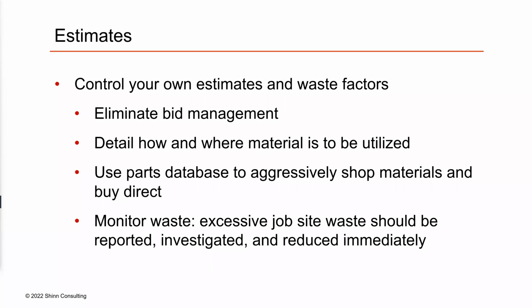Bid management is when I'm paying a vendor to supply a product. As we go out and look at waste on sites, I'm stepping over product all over the place. And the superintendents almost always tell me, that's not my drywall, that's the drywall guy's problem. That's not my lumber, it's the framer's problem. He supplied the lumber. Well, guess what? You paid for it. By the way, you paid for that drywall, you paid to have it delivered, you had to pay for it to have it installed, and then you paid to have it taped. So I want to get out of bid management. There's several percentage points potential on that. So I'm going to let Dave take over on estimates because that's literally his wheelhouse.